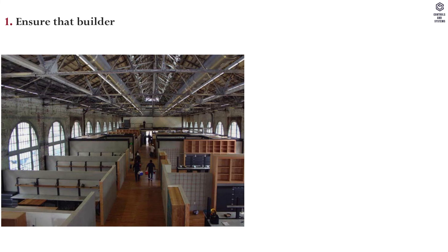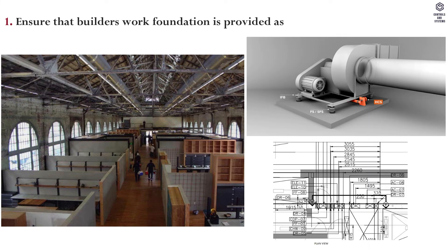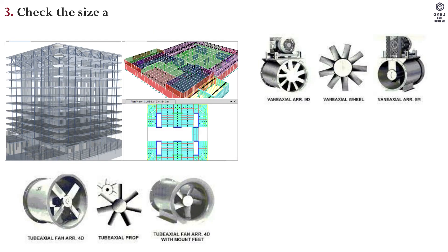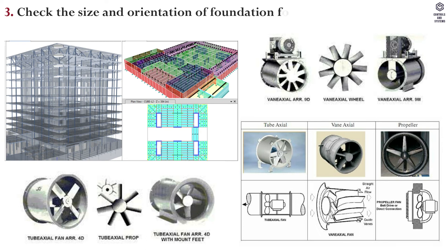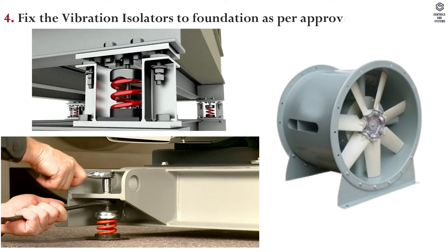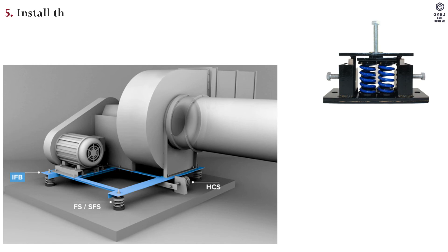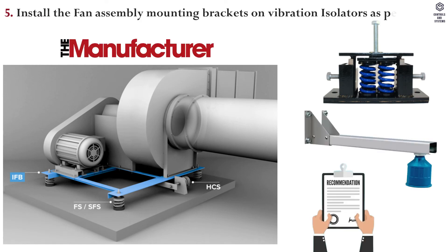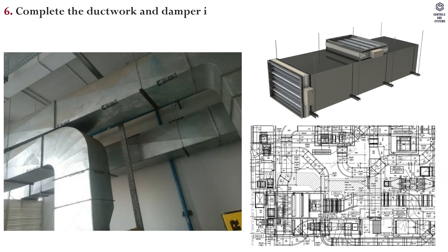Installation of floor mounted fans: 1. Ensure that builder's work foundation is provided as per approved shop drawing. 2. Ensure the level of foundation by spirit level. 3. Check the size and orientation of foundation for its suitability to install the fans. 4. Fix the vibration isolators to foundation as per approved submittal. 5. Install the fan assembly mounting brackets on vibration isolators as per manufacturer's recommendations. 6. Complete the ductwork and damper installation as per approved shop drawing.